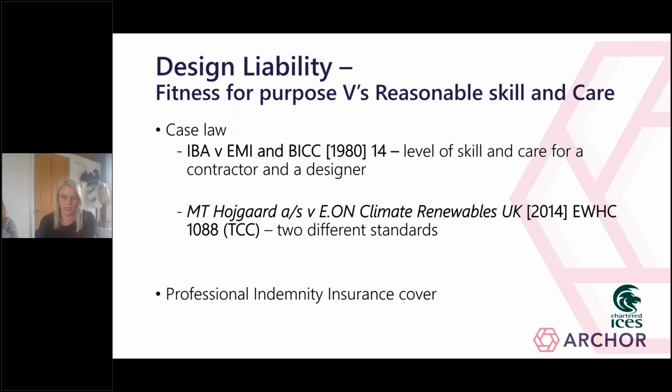In this case, the court distinguished between a contractor's level of skill and care and the skill and care of a designer. And the court effectively said that in the absence of anything to the contrary within the contract, a contractor guarantees that the finished product is fit for purpose, and this includes the obligation for design. So what has emerged from this case is quite a bizarre situation where a contractor's duty of care for their design is higher than that of a designer. This is why it's important that any reference to the standard of care for design is that of a designer and not a contractor.